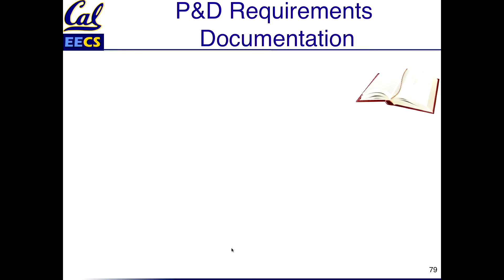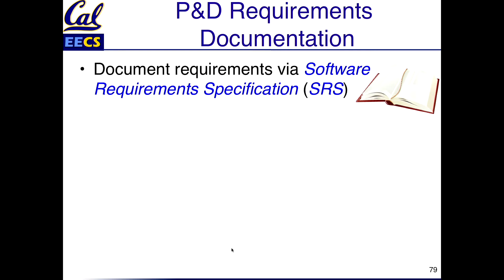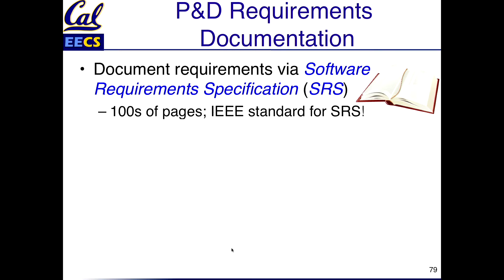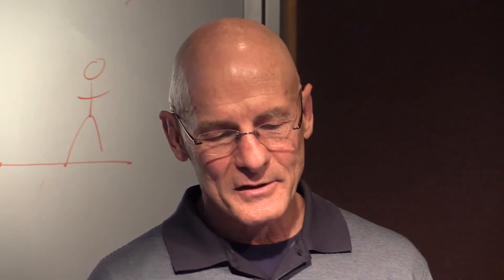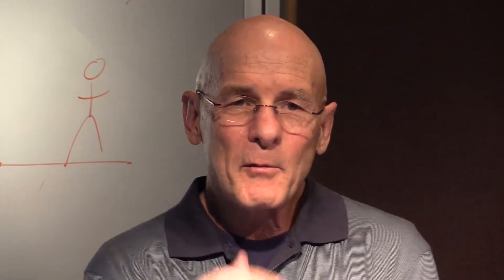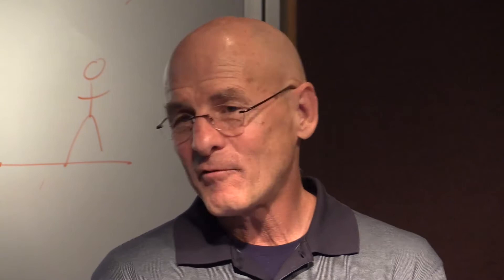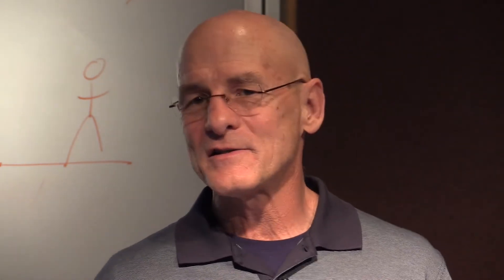After you've elicited the requirements, you do documentation — and this is serious documentation. It's called the SRS, which stands for Software Requirements Specification. These are big — hundreds of pages. There is even an IEEE standard on how to write an SRS, giving you a document that describes a standard about how to build this document. This is inspired by the idea that software doesn't work so we've got to make it like civil engineering — civil engineering has a lot of documents.